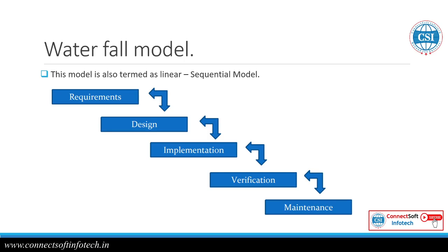And now the prototype model comes into the picture. When we use the prototype model, we gather the requirements and we can define the prototype directly. We design the software and directly define the prototype, that is a demo to the customer. Then the customer will evaluate that demo working model of the software, and can add some features there.